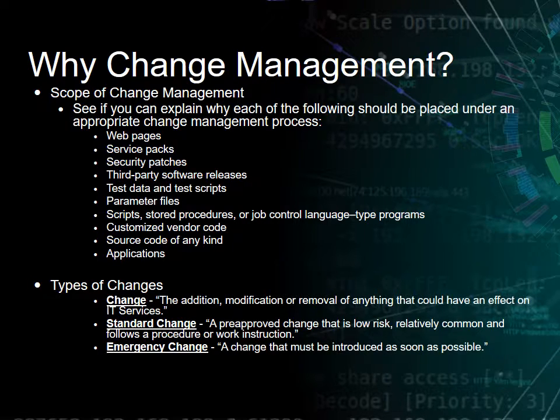And then emergency change would be a new patch comes out for a security vulnerability that is a hot topic or a hot push, actively being exploited, and potentially catastrophic to your organization. You streamline the process of approving that change so it can get into effect and block an imminent risk.